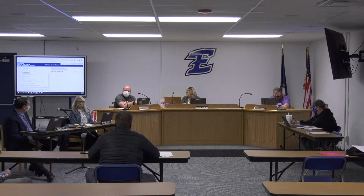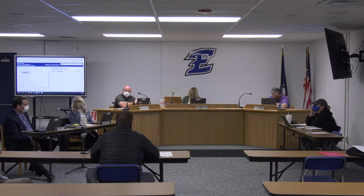So we're moving forward. KDE's working well. We're getting ready to release our furniture bid. We're working with Ross Tarrant on the furniture bid, and that bid's getting ready to go out probably in the next week, somewhere in that neighborhood. We'll have prices back in 3 weeks. We've got a lot of equipment to buy. There's over $1 million worth of furniture and equipment in that building. But we'll get it done. KDE's been working with us. And of course, when we get the principal there, the principal can start doing a lot of that work, and it will move away from us.